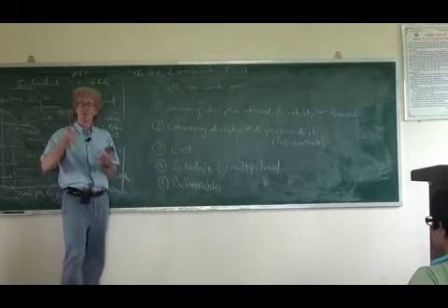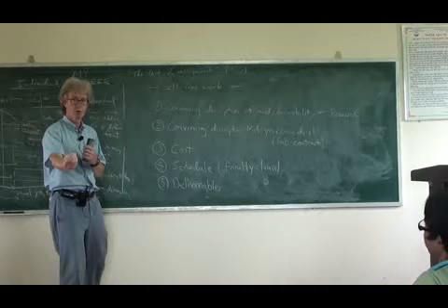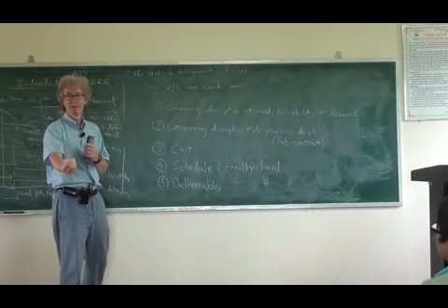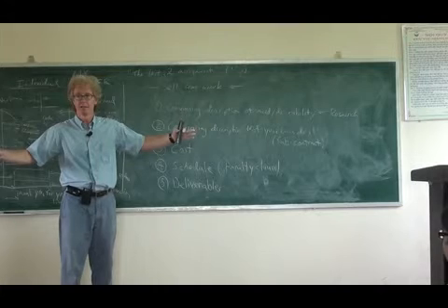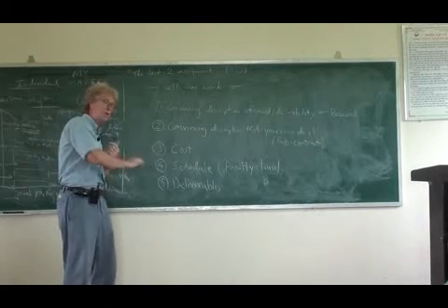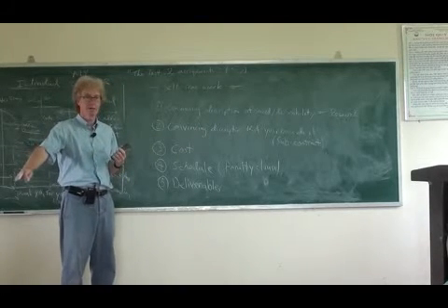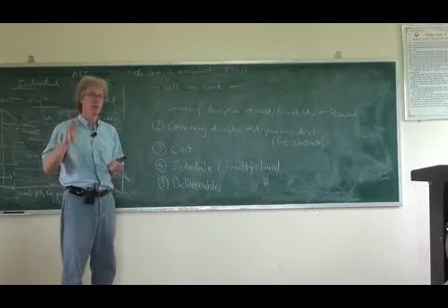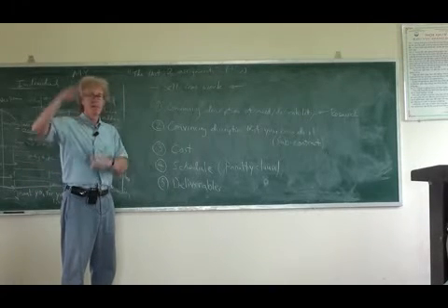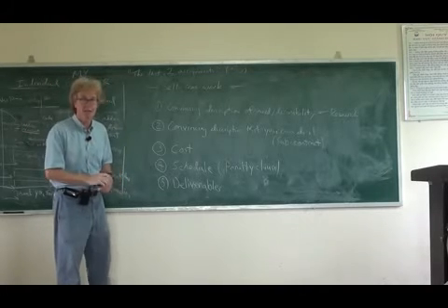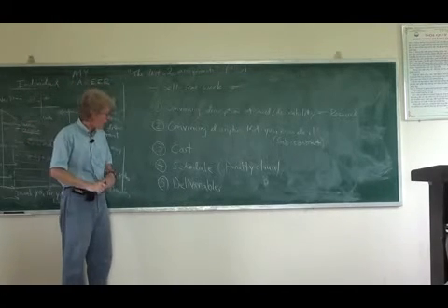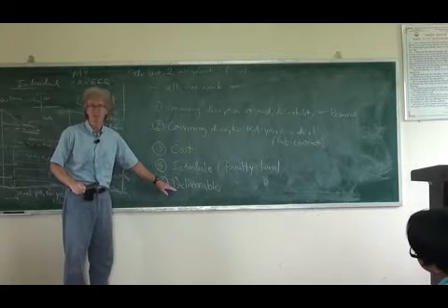So in the end, I'm going to deliver to you a highway to Hanoi. I guarantee it's going to be at least 15 meters wide. I guarantee it'll hold up a truck at least 50 tons in weight. I guarantee the bridges that go over the rivers will be above the flood stage of the river. Right? I have to guarantee a lot of things depending on what they want. And that's all going to be written down as a deliverable.